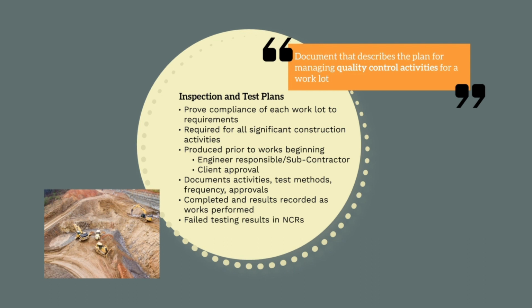Although this is not always the case, they are typically produced by the engineer responsible for the works, but in some instances may also be produced by subcontractors. Following their production, they will then get checked internally by the project quality team before being issued to the client for their review and approval. As the ITP will document the ultimate verification and validation for the works completed, the client will review ITPs very carefully.